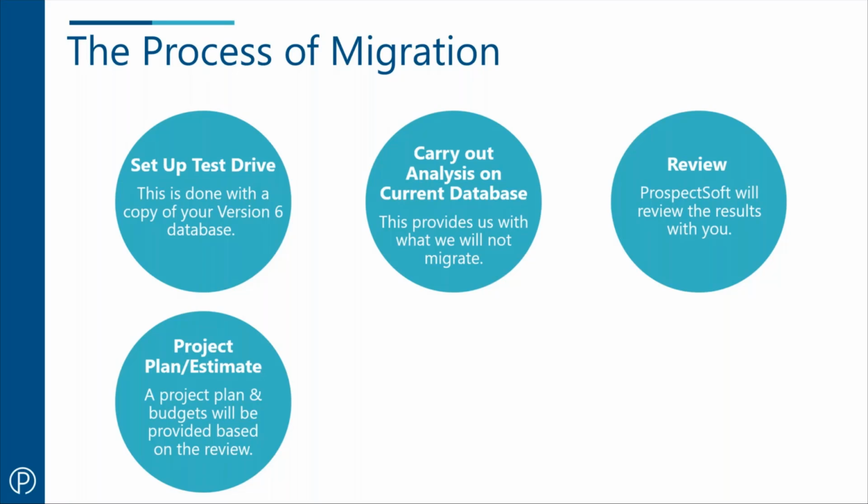And that project will include possible timescales, depending on the amount of work that we need to do, and any costs associated with the migration in terms of the rewrites of the reports, tabs, and any other custom plugins and features that you have. So all of that will be put into a document for you, and we will propose that this is what we will do to get you migrated over to 365, and this is the cost of doing that migration.